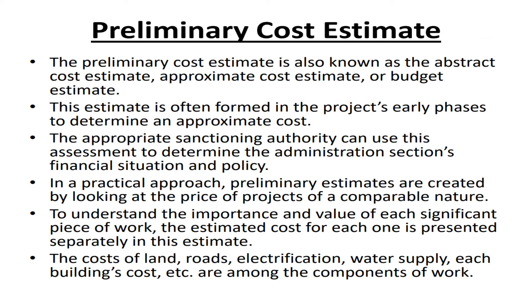Preliminary cost estimate: The preliminary cost estimate is also known as the abstract cost estimate, approximate cost estimate, or budget estimate. This estimate is often formed in the project's early phases. To determine an approximate cost, the appropriate sanctioning authority can use this assessment to determine the administration sections, financial situation, and policy in a practical approach. Preliminary estimates are created by looking at the price of projects of a comparable nature, to understand the importance and value of each significant piece of work.